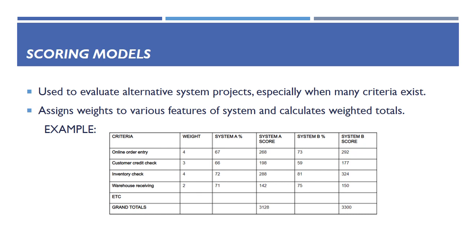Next is the scoring model. It is helpful for choosing projects when various factors need to be taken into account. It weighs the individual components of a system before calculating the weighted sum. The business must choose between two alternative enterprise resource planning solutions. The decision makers' evaluation standards are listed in the first column. The decision-making group typically holds lengthy conversations to determine these criteria. The agreement on the evaluation criteria is frequently more significant than the score when using a scoring model. Using the scoring model involves making several qualitative judgments, and experts that comprehend the problems and the technology are needed for this model.